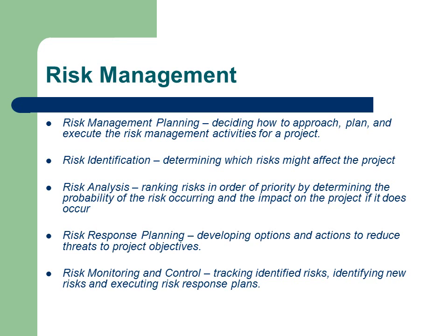Risk management. Risks are events which may happen and may adversely affect the project outcomes. Risk must be managed throughout the project through applying the following processes. Firstly, risk identification, determining what the possible risks may be. Risk analysis, determining the probability of the risk occurring and the impact on the project if it does. Risk response planning, developing options and action plans to reduce the threats to the project. And risk monitoring, risks must be constantly reviewed throughout the project.